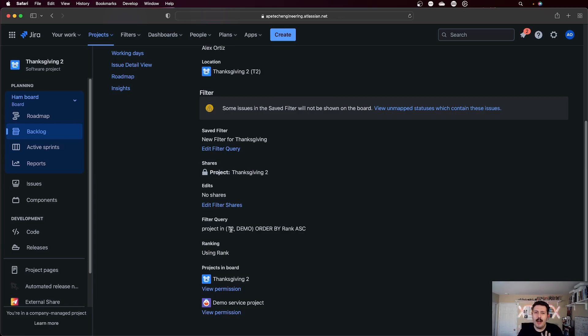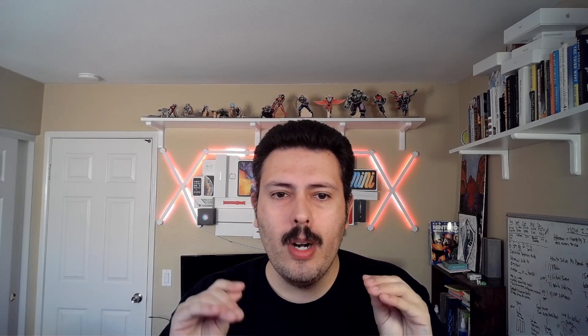So you want to be very, very careful that when we do this, this is the bad and the ugly all in one bundle here, because when we do this, this can cause tremendous headaches for you. So you never want to create an opportunity where an issue is going to be in two active or two scrum boards at the same time, and worst case in two active sprints at the same time, because this is going to cause all kinds of headaches. There's a way to ensure that this doesn't happen. I'll talk to you about it here, but I just wanted to get this all out of the way.